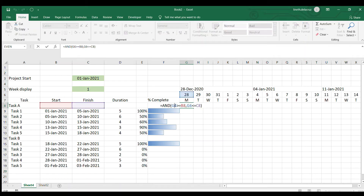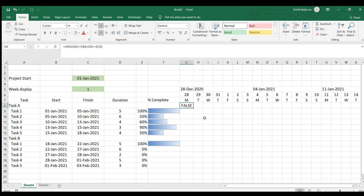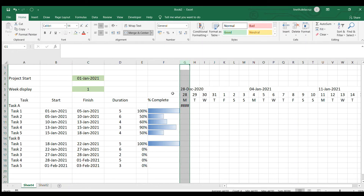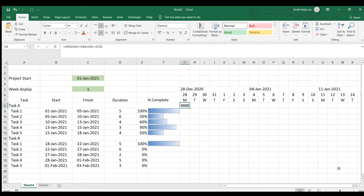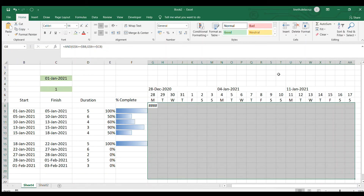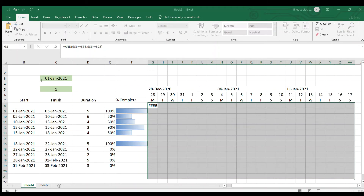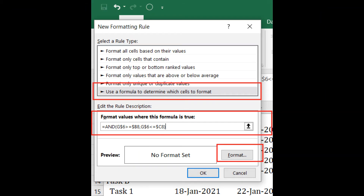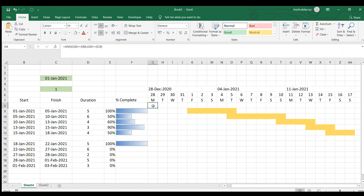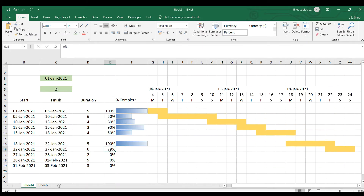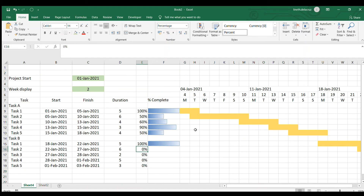I'll fix the anchoring — I don't want to move the row here, and I don't want to move the column here. Just a single dollar sign for each. Then I'll copy this formula, select all the cells in your chart, go to Conditional Formatting, New Rule, Use a Formula, paste the formula in the bar, choose the Format Cell fill tab, and choose the yellow color. It's now working — when I change the week display, all the yellow bars here will be reflected.